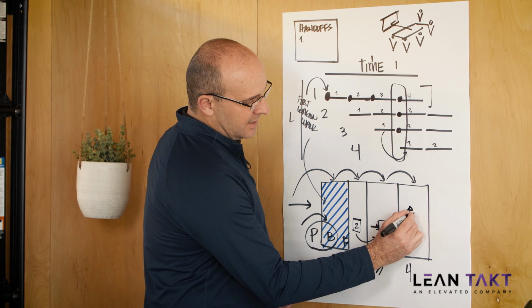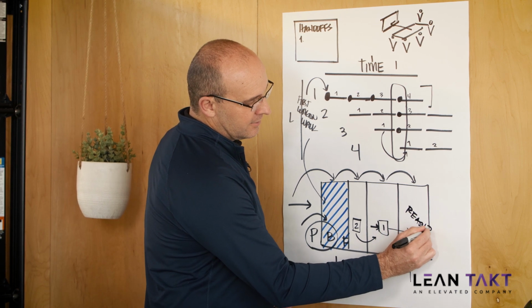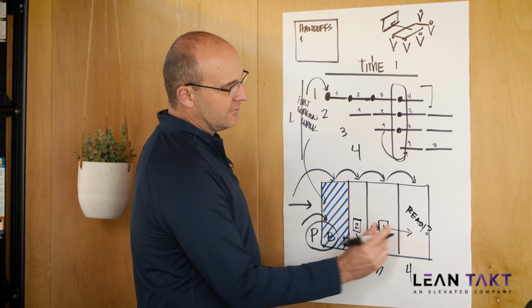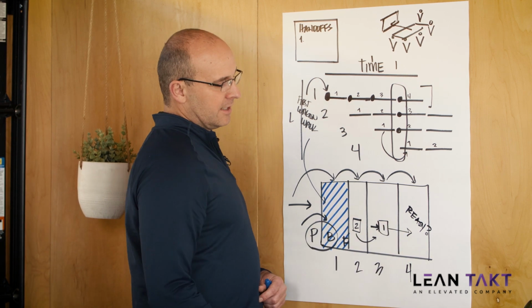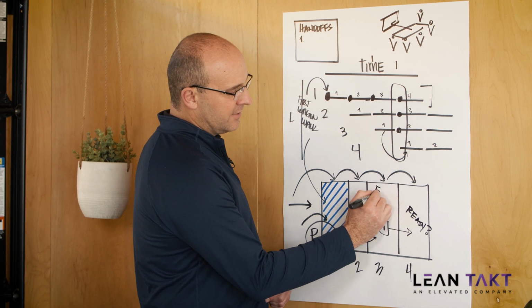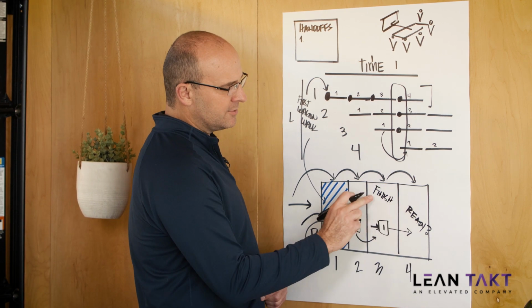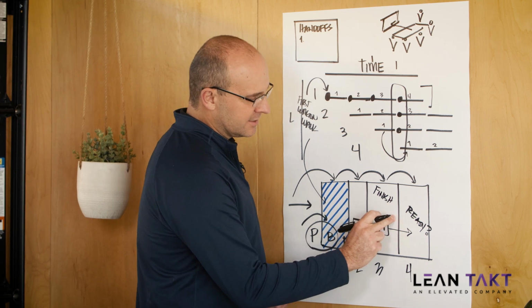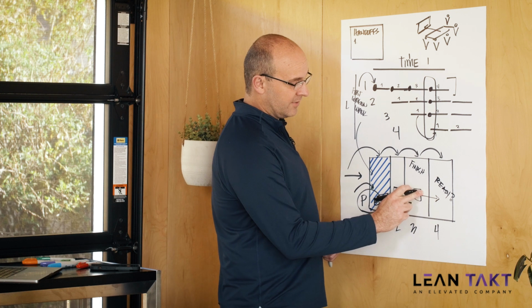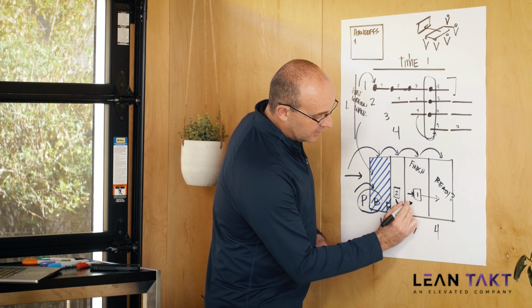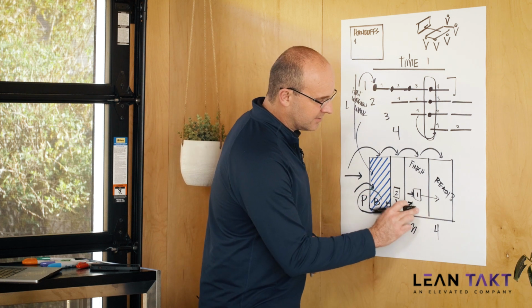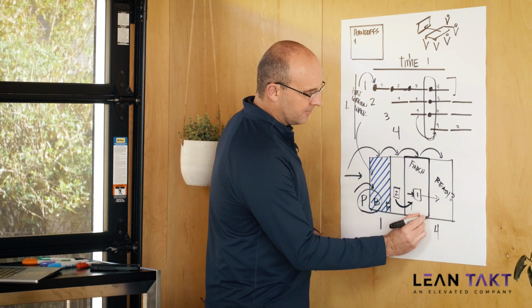First of all, is this area out ahead ready, okay? Can wagon number 1 or trade 1 or activity 1, whatever is in your TAKT plan format, is it ready to move on? And are they going to finish in here, which means clean it, demobilize, inspections, move their equipment out, finish their work, leave it better than they found it, so that they can pull wagon number 2 or activity number 2 or trade number 2 into this zone right here.